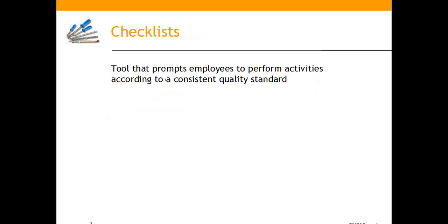Checklists. In the project, we have to decide what all checklists we are going to use. We used to use things like contract review checklist, requirement review checklist, design review checklist, code review checklist. So these things help for two reasons. Checklists are used by people who are new to the job. That is one reason, because that will bring consistency into the process.